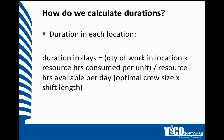How do we calculate durations in an LBMS schedule? Durations in days equals quantity of work in location by the resources and hours required to consume each unit of that work. We then divide that total number of man-hours by the resources available for the day, or the optimal crew size multiplied by the shift length.